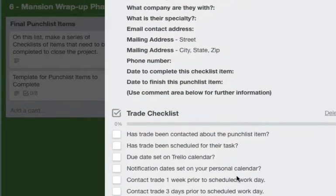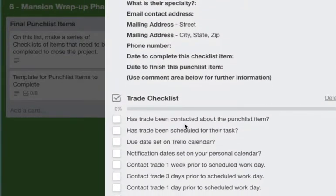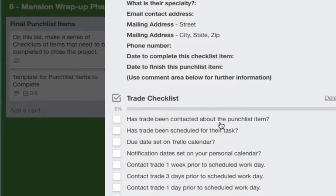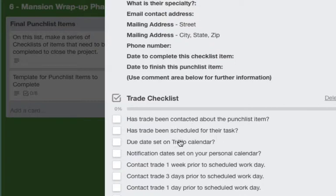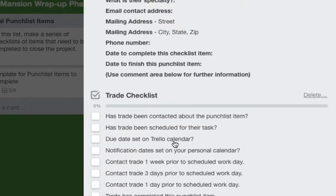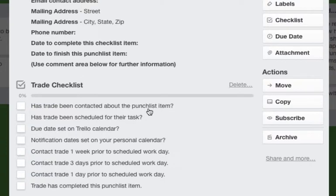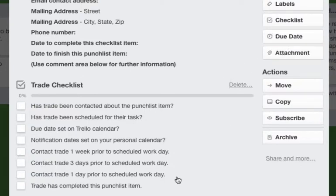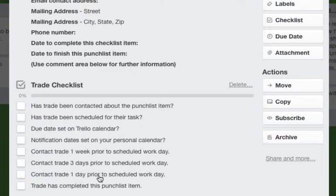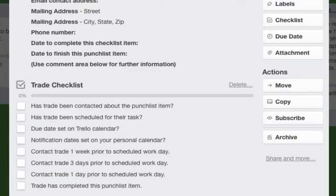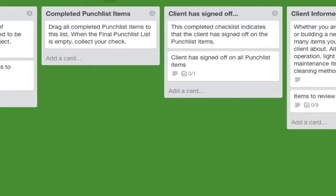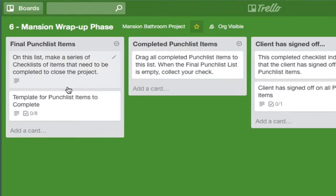And down here, very similar to our work order checklist: has the trade been contacted about the punch list item, has the trade been scheduled for their tasks, the due date set on the Trello calendar right there, and your notifications one week, three days, one day. And when this is finally done you'll say the trade has completed this punch list item and that item can be moved to the completed punch list item.